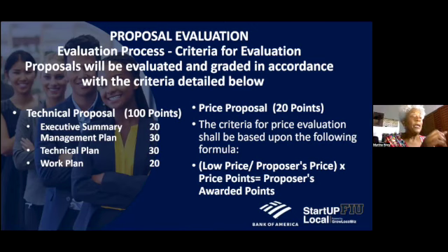And that's usually, you have to have a schedule, because I love to see a delivery schedule. So if we have to have monthly reports every month, or you have to give, and I believe the one that you guys are reviewing is asking for a draft report and a final report. So a timeline of when, and then including the review time, all that lets us understand that this company really understands what we're asking for and how they plan to deliver it.